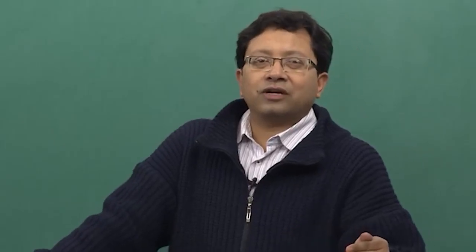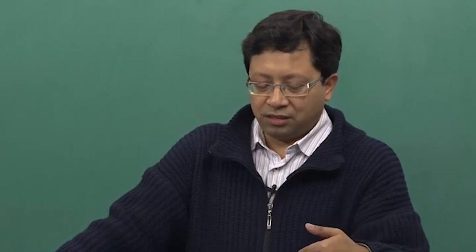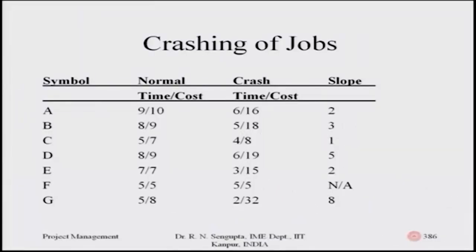As a further continuation of that concept, we will also consider how costs are factored in. This slide presents data related to normal time and cost — shown in the second column — for jobs A through G. The crash time, meaning reduced durations with their extra costs, is in the third column, and correspondingly the slopes are given.